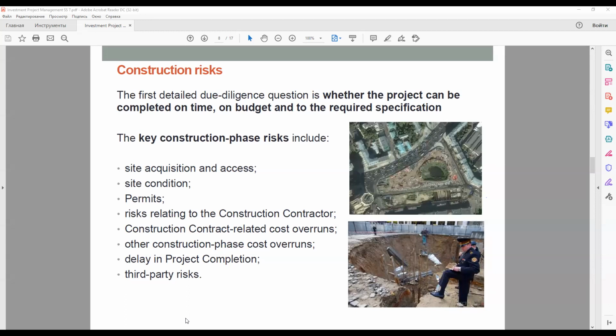Pre-existing contamination or discoveries at the site. Extra cost can be caused by delays due to the discovery of fossils, archaeological remains, human remains, and so on. Again, this is a risk which would normally be assumed by the construction contractor.